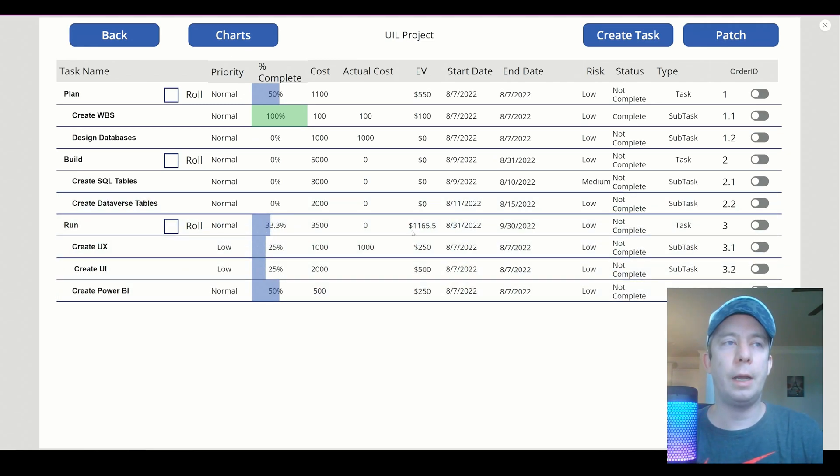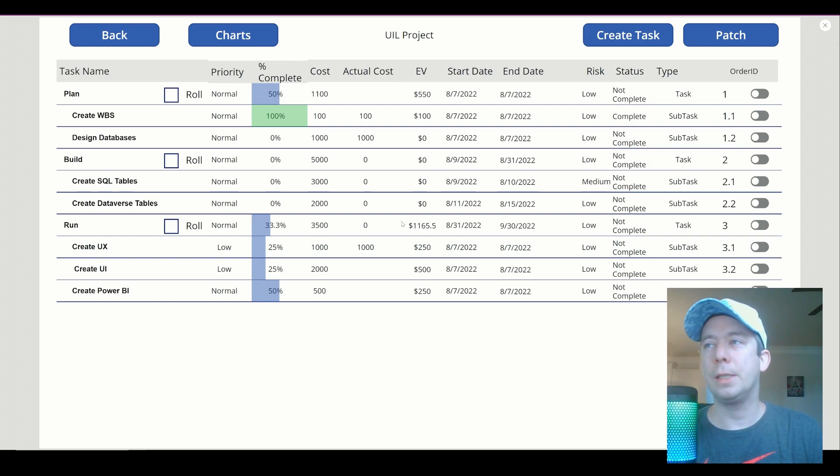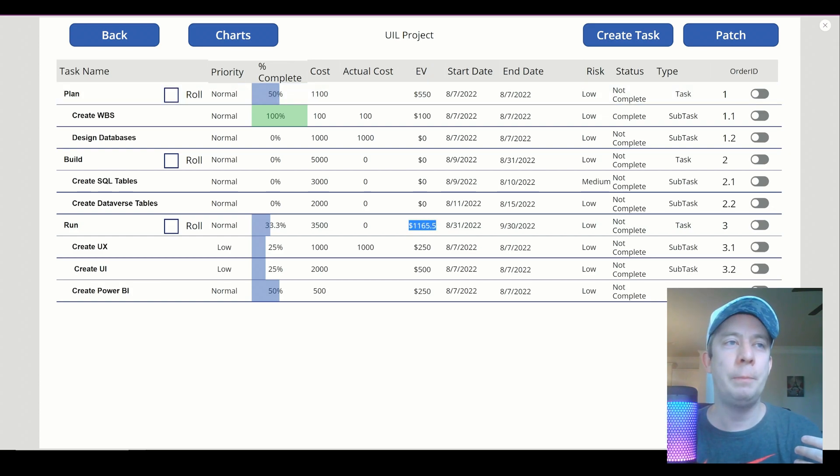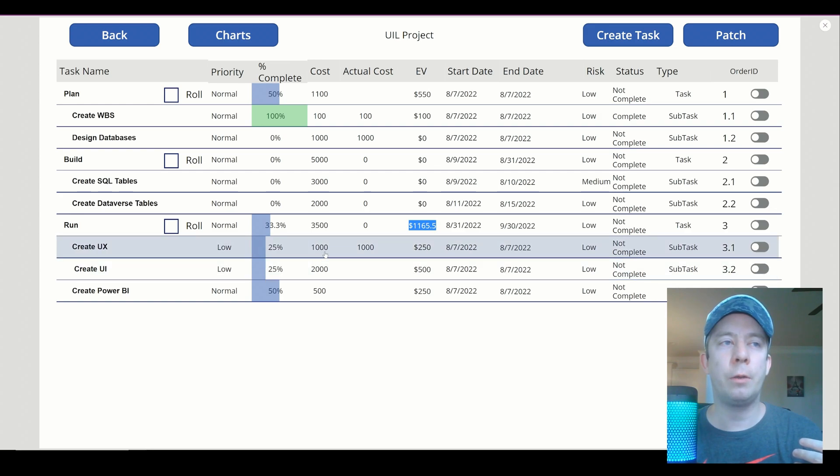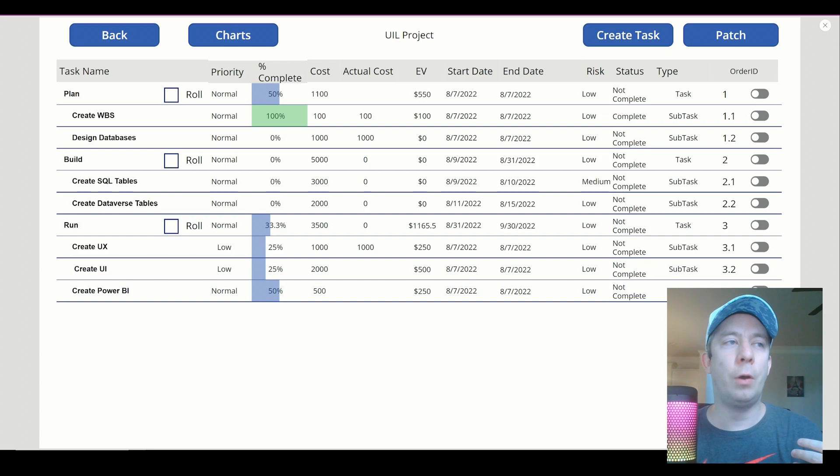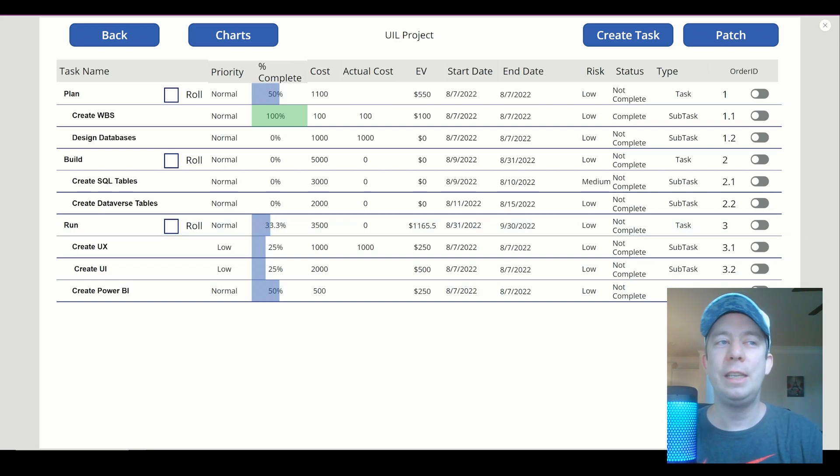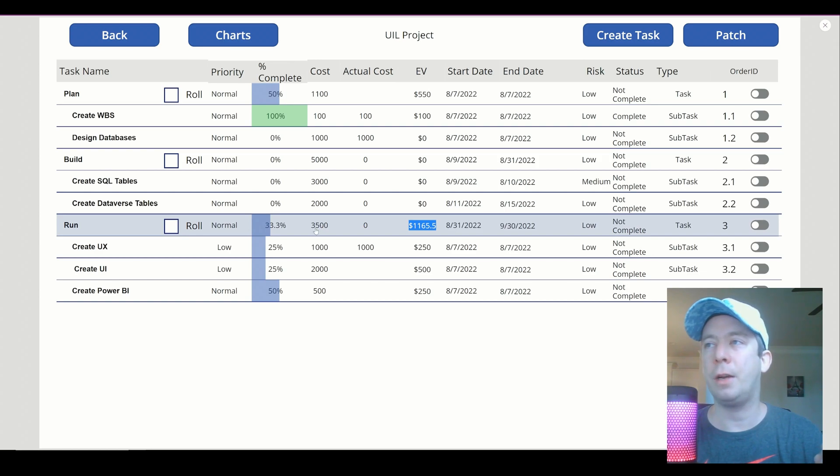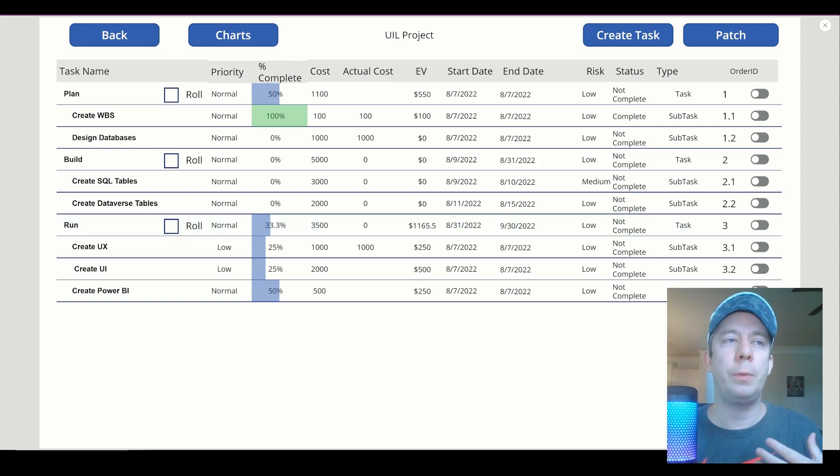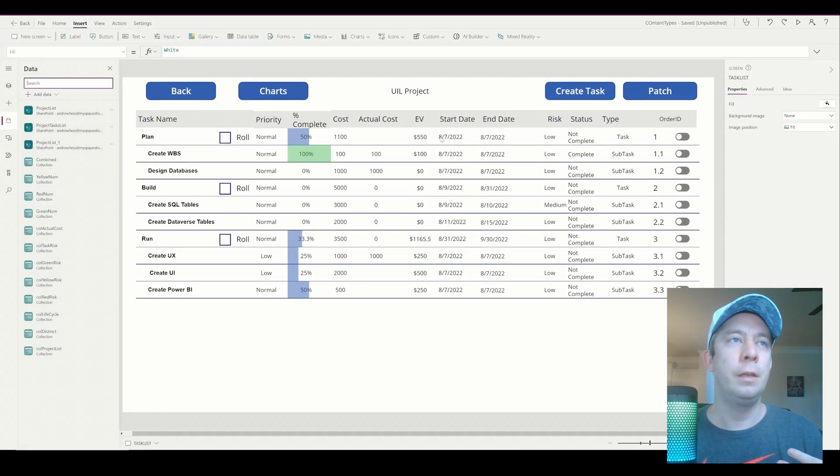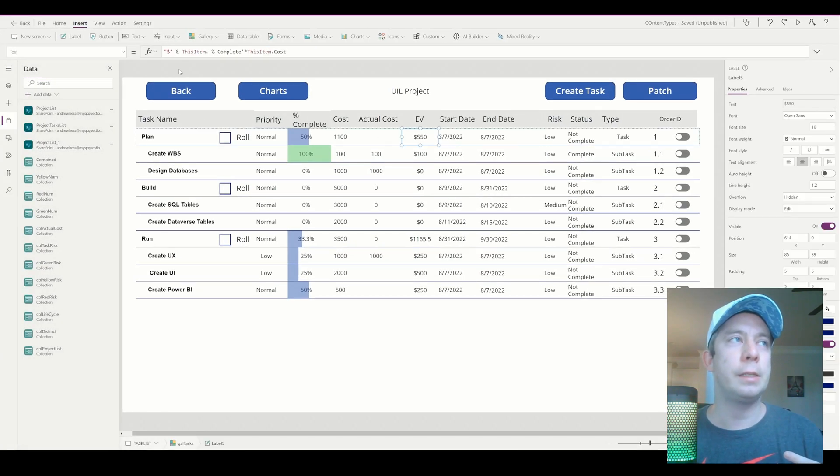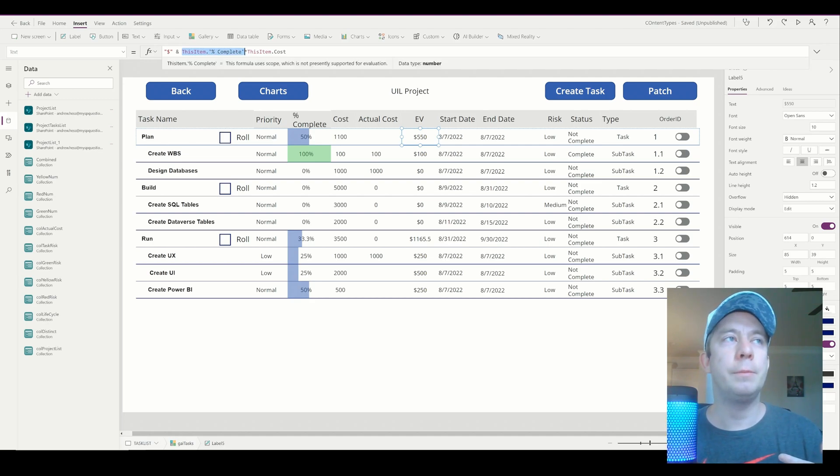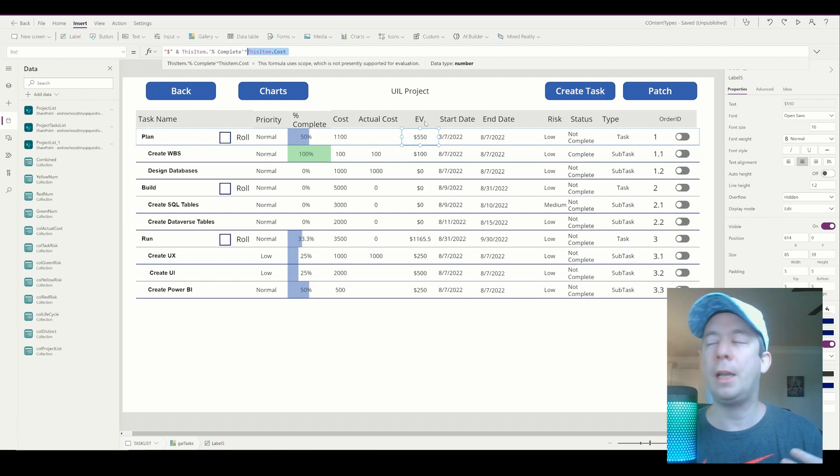You'll notice that my earned value is actually already calculated. Isn't that really neat? Because we calculated earned value in Power Apps, it's actually multiplying the 25% by 1,000, multiplying this, and then it's adding them all together based on the cost. So we have 33% of 3,500 EV is already calculating because it is multiplying 33% by 3,500. EV is already calculated. That's something we don't even have to roll up. So it's really neat. So you notice right here, we're just multiplying this item.percentcomplete times this item.cost, and that's calculating our earned value.